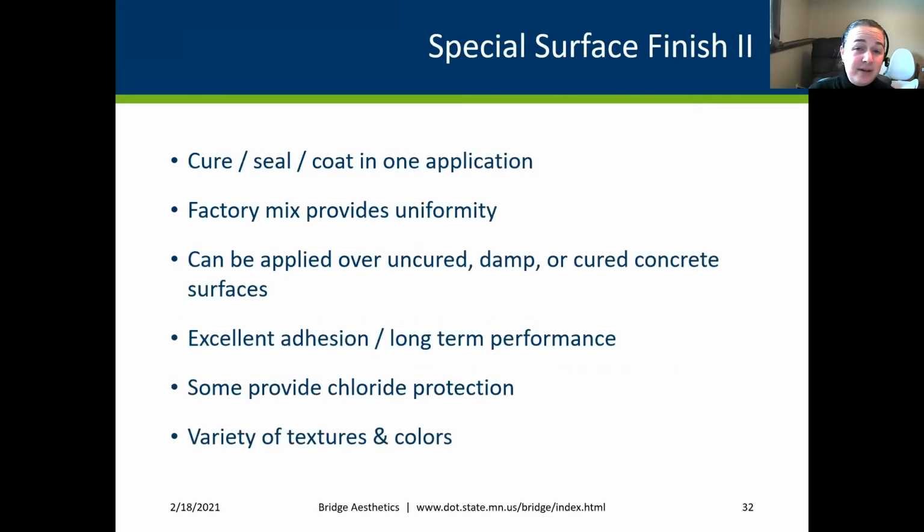But now they can be used as a curing compound. We are always chasing winter, so they can actually just now go over with these new special surface finishes as a curing compound, just cover it right up, and not have to wait that 28 days we used to have to wait with paint.